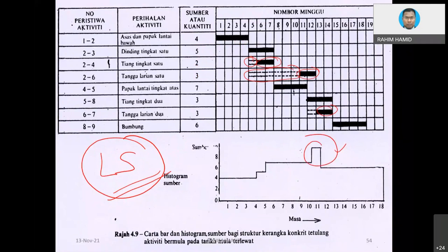If you look at this peak, where does this peak come from? This would be on day number 11. Day 11 is here. 3 plus 7 would be 10. So this is 10. The graph is a little bit off, that's okay. So the peak is coming from these two activities, activity 2-6 and 5-4. So the issue is, can we do something with activity 2-6 and 5-4? For sure, we cannot do anything with 5-4 because it doesn't have any total float. Meaning to say that activity will start at that time frame. The only thing that we can push is activity 2-6